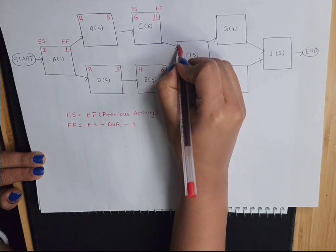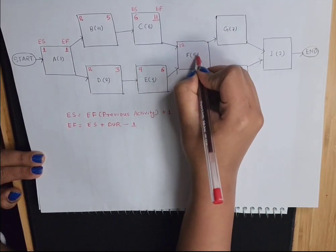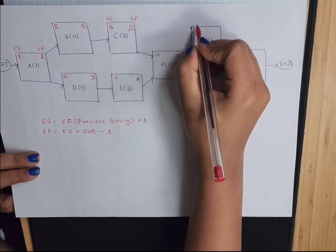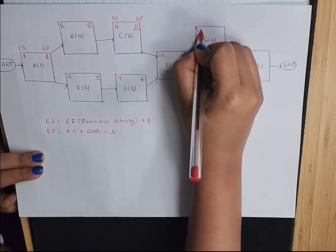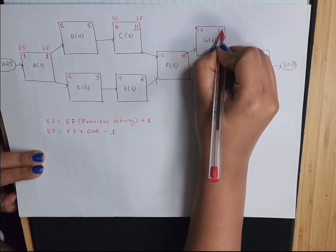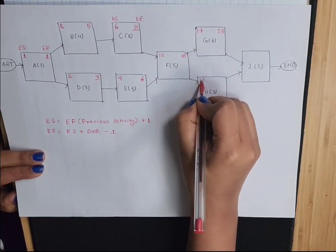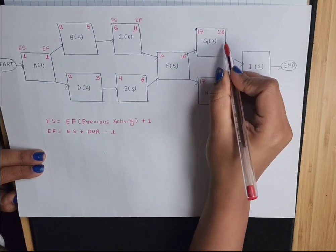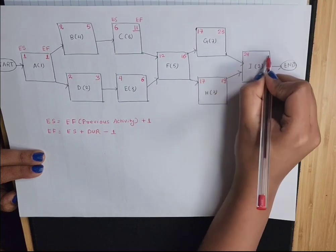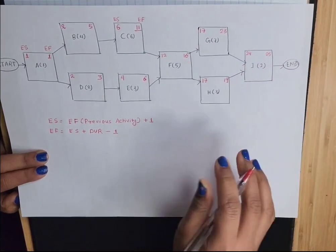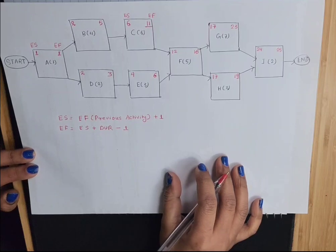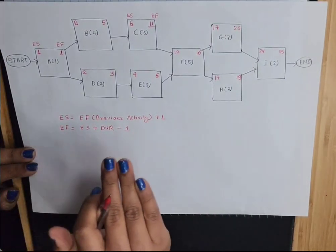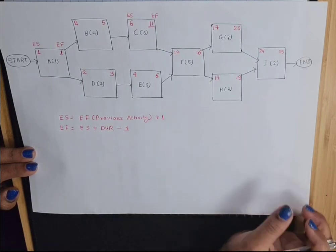So F is going to start on day 12. Then 12 plus 5 is 17, minus 1 is 16. For G: early start 17, early finish 23. For activity I, we take 23, so early start 24 and early finish 25. This is how we calculate the early start and early finish for any given project network diagram.